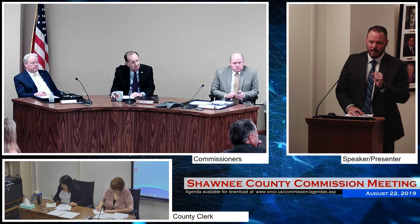On the other extreme is construction manager at risk, and we have used construction manager at risk. We're using it right now on the event center project. We did that because we're going to continuously operate that facility. So you use that when you have a highly complex project where there requires a lot of coordination between the contractor and the owner, like the expo center. Okay.